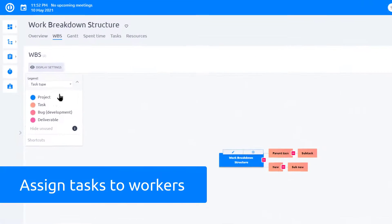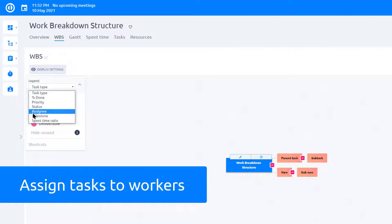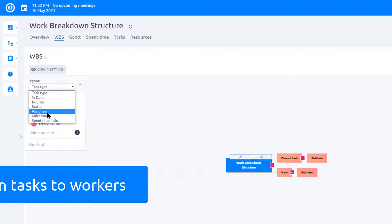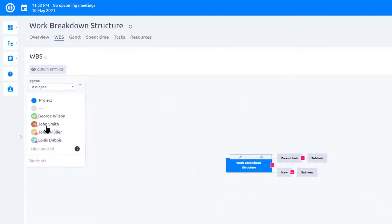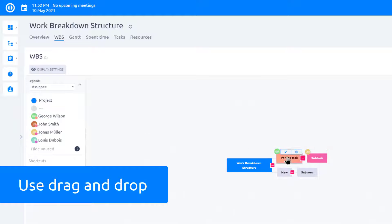You can assign tasks to workers right here in WBS. Select Assignee from the drop-down menu and use drag and drop to assign tasks to the specific workers.